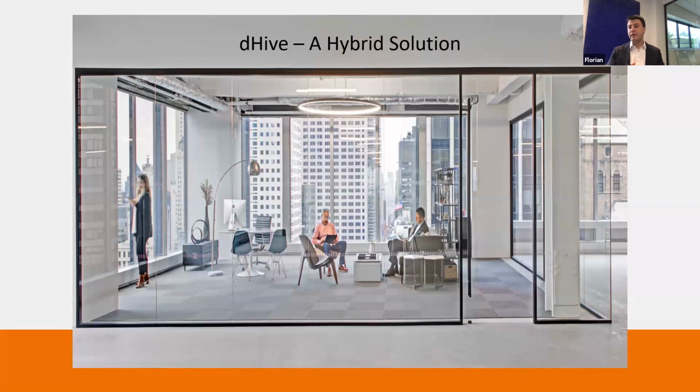When you have a prefabricated wall system, no matter how much effort you've put in before into making sure the site can welcome, and has been built to welcome, the wall system, there are always a lot of unexpected things. It can be unexpected elements that are on site. It can be that the site dimension is slightly different from what it was supposed to be. It can also be human error, or a mistake when you level the floor, or a sub that doesn't put the drywall where it's supposed to be. And when you run into these, then you run into, okay, how am I going to fix those problems?